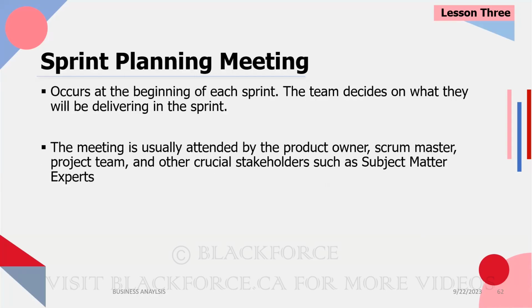I talked about the sprint planning meeting. The sprint planning meeting happens at the beginning of each sprint. So basically, even before the sprint begins, it could be maybe a few days before the sprint begins, the team decides on what they're going to be delivering in that sprint. So again, usually the entire project team would be in the sprint planning meeting. Sometimes you may invite a subject matter expert, maybe like the marketing manager. Say you're trying to understand the sequence of things, and you need to build based on the sequence. If nobody has that knowledge in your team, you can invite a stakeholder to come share their expertise with you.